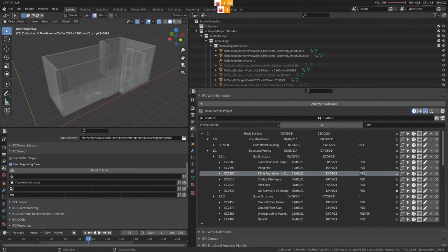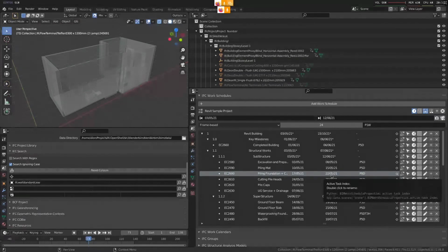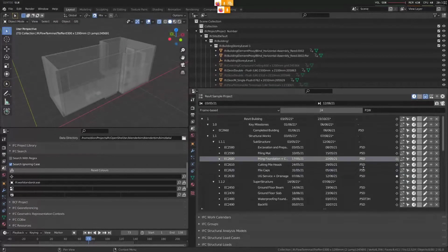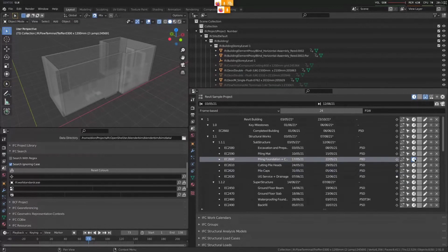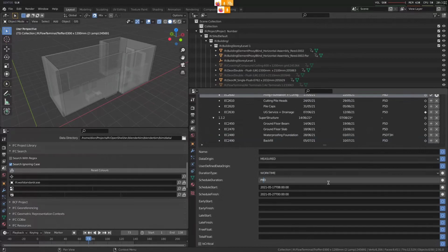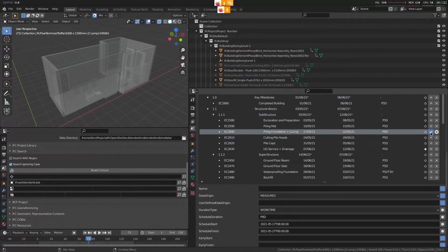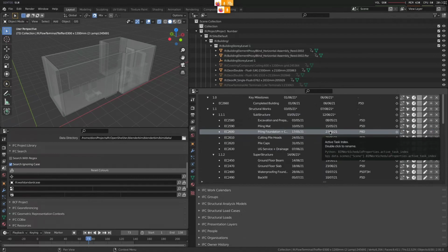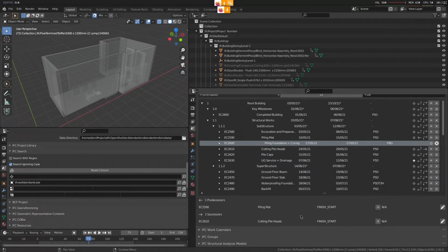So again, if I change a date, for example, it should recalculate this one, but it didn't. Refresh, maybe. Okay, all right. If I type it in this way, like 8 over here, and then press the save button, it works. It calculates it. But if I press this one here, it doesn't recalculate the successor, because what it needs to do is push the successor forward by the new finish date. But it hasn't done that.